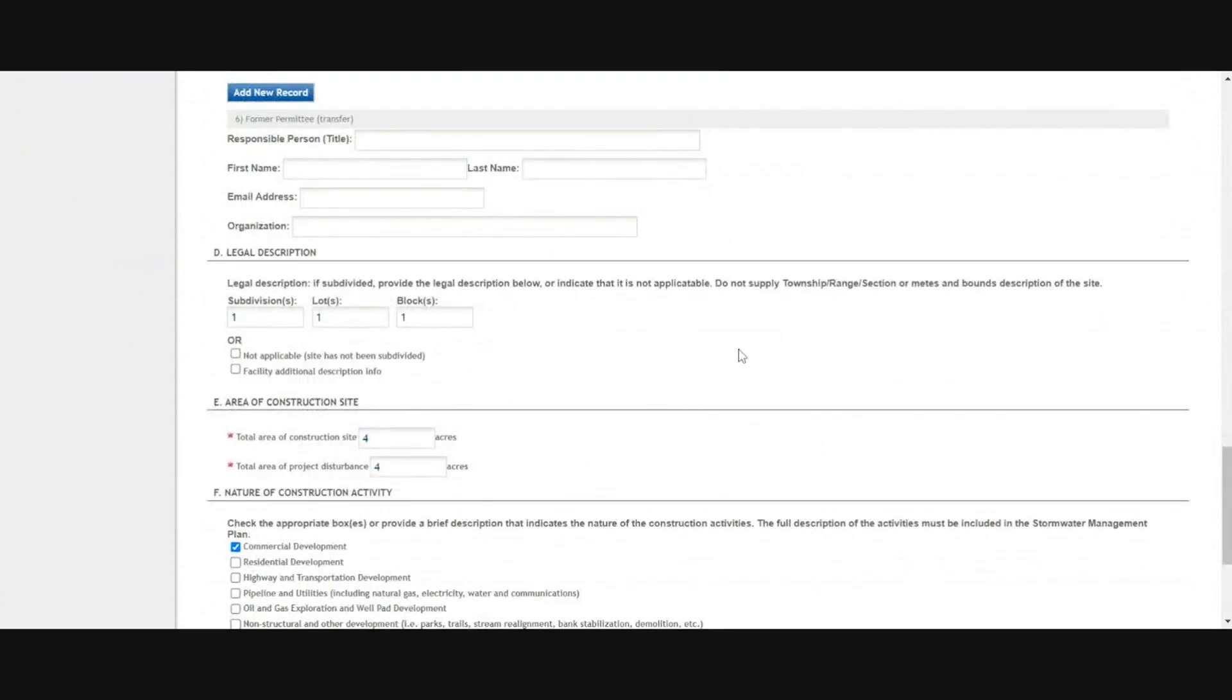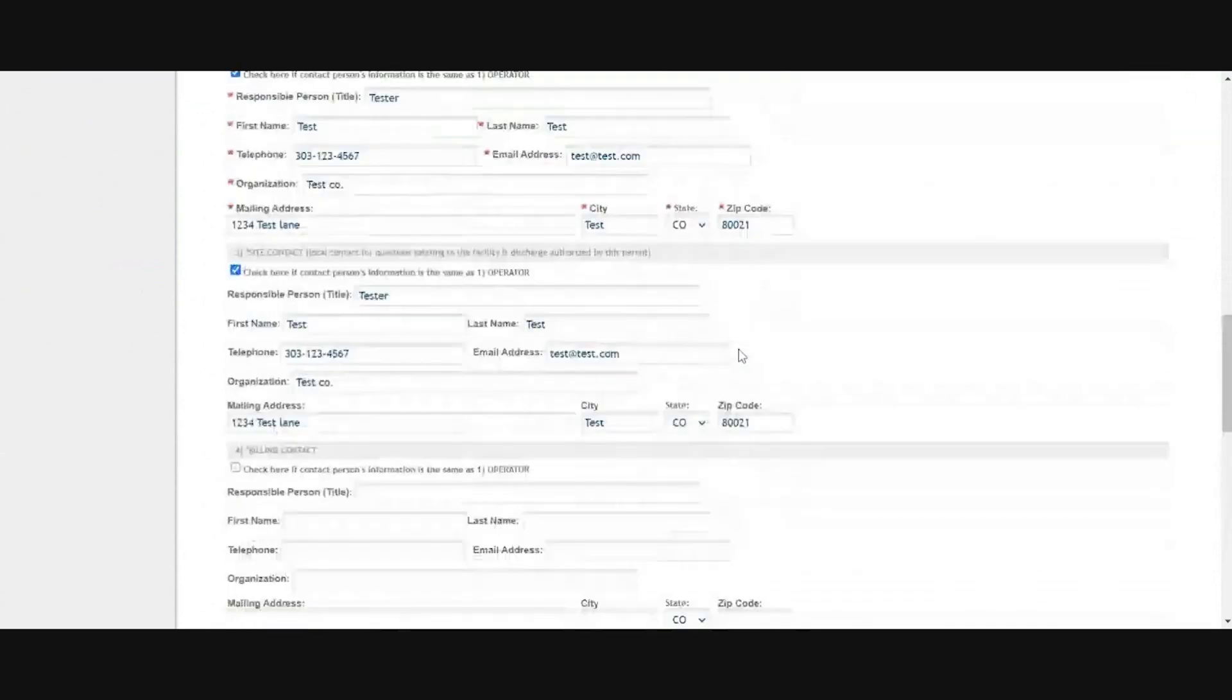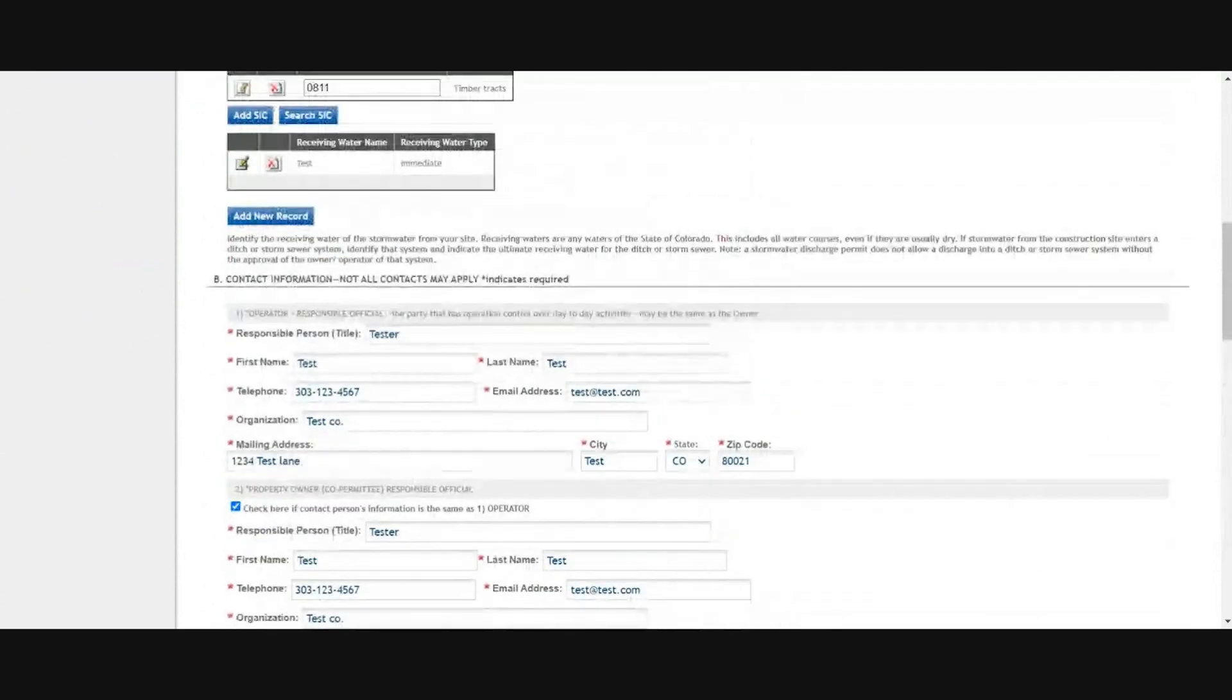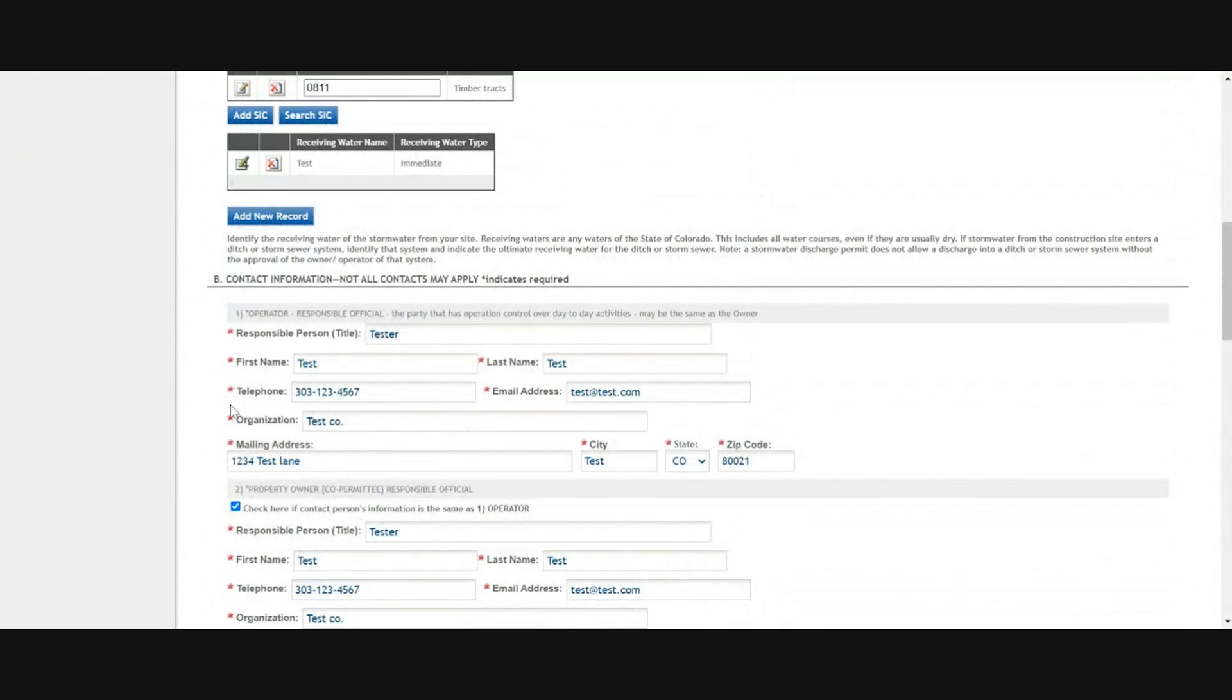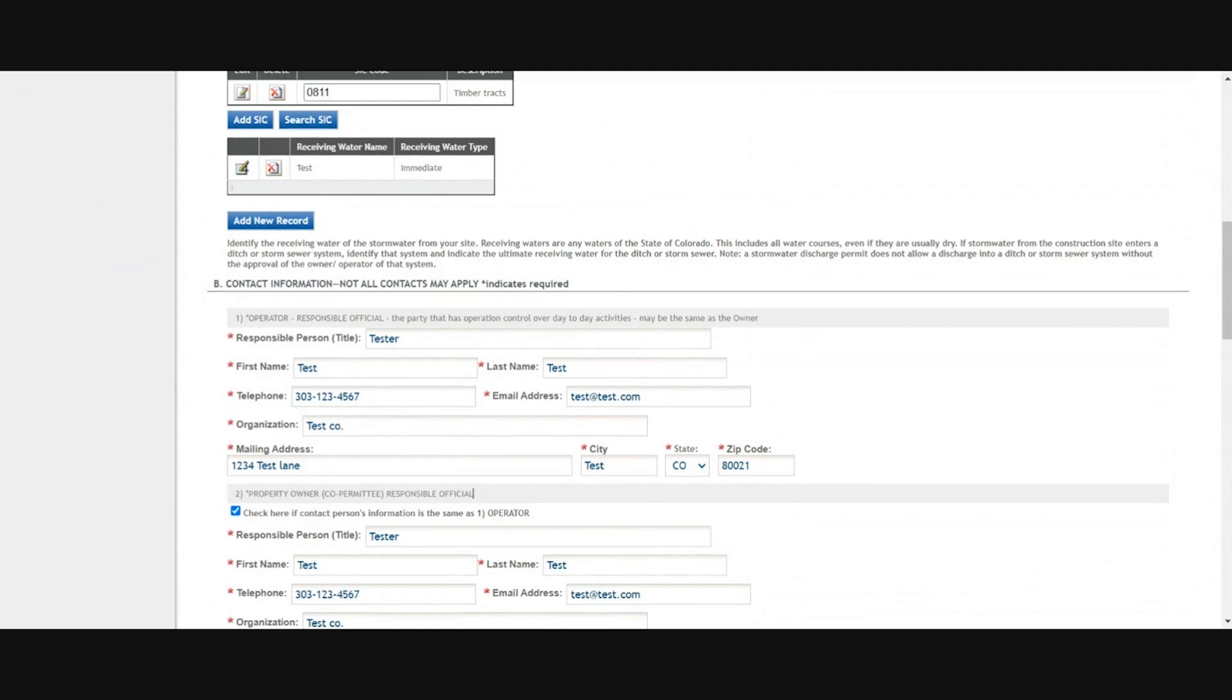The only case that would require a separate action would be if you're transferring the permit between companies. If the company is changing for either the owner or the operator, please submit a transfer application first. Once that's approved, you can do the renewal. Otherwise, just make all changes on the form.